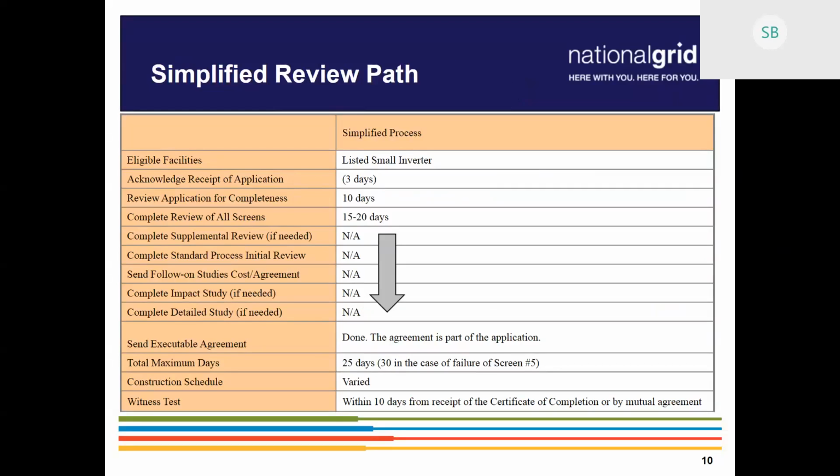And if you fill that form out electronically also, there are some options on the back end that, again, can help you get that work request turned back around to you quicker. Also, having that form into us and the inspection called in before you submit your completion documents just helps it run smoother, reducing the back and forth of having to put on holds and wait for the inspection.